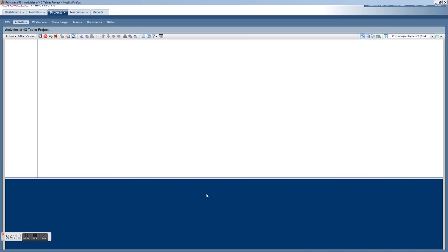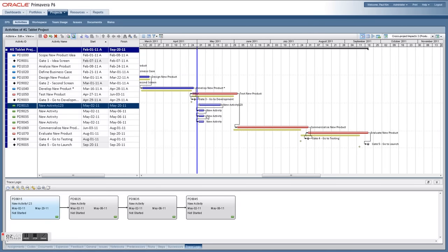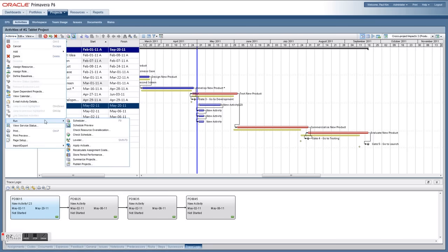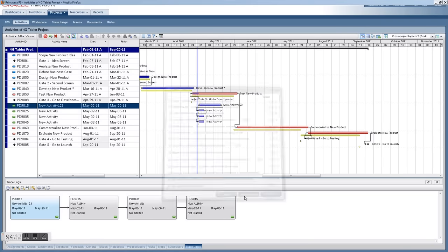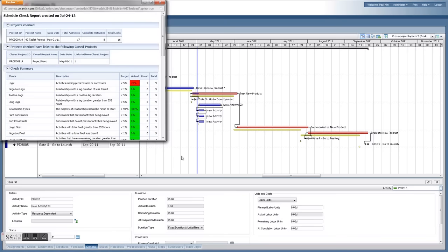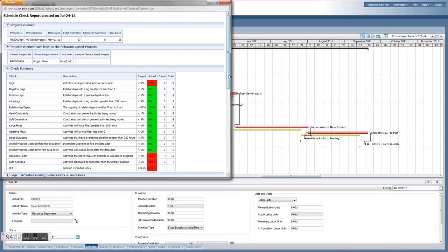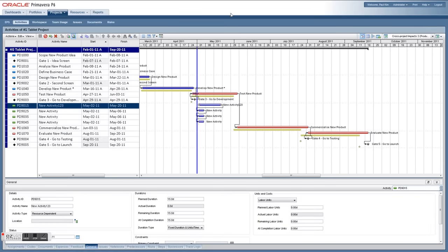Here's an example of a more sophisticated layout comparing the schedule and the baseline. For savvy schedulers, Oracle Primavera P6 has a 'check schedule' feature that runs analytical schedule analysis based on thresholds you define, such as logic, negative lag, positive lag, and so on.